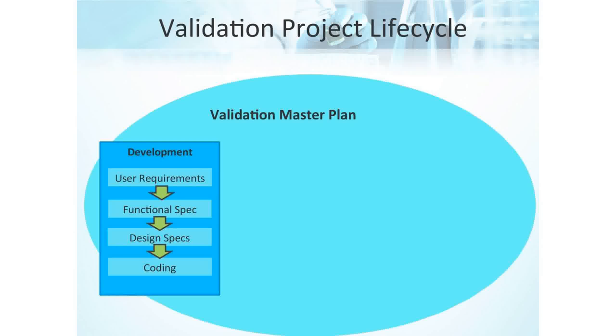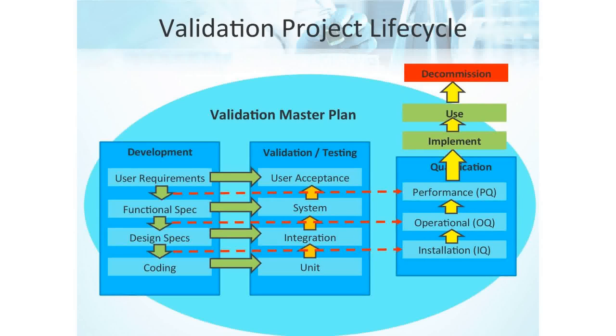Yeah, it's very true. So let's expand this chart a little bit and talk more about the validation lifecycle. The order of qualification is from the bottom up in this diagram. And I also want to pause, and we haven't had any comments yet. If we're talking too fast, too slow, if people have questions or comments along the way, don't be shy. We'd love to have you interject. So going bottom up on this diagram, in that middle column there, first the system is installed using the code that was unit tested.